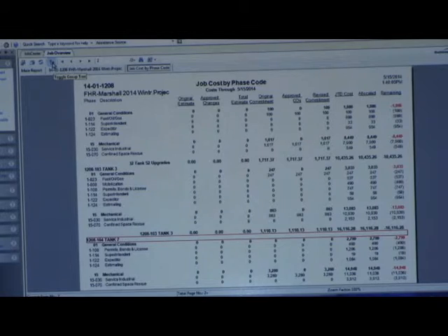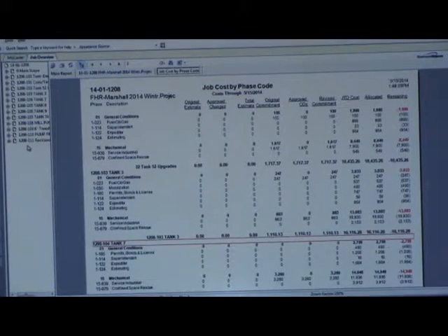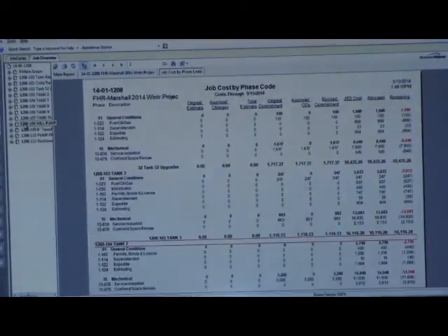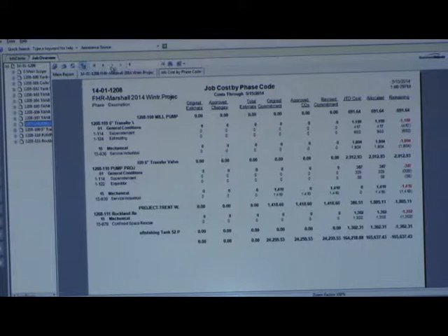And so this is showing these little 3 boxes called the group tree. If you turn on the group tree in this job cost report, it's grouping first by extra. So you can jump to any extra to see the costs associated with that. And then at the grand total, it'll have a grand total for the job as well as a subtotal for each of the extras.